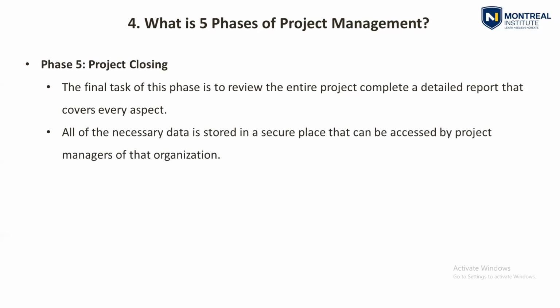And they can access anytime at any period of time, maybe 10 years after the project also, they should be able to access, because to identify the risk on the same particular projects they are going to handle in the future. So maybe it can be saved in your company's local servers also, you can save those documents and it should be protected, access should be given only to project managers. If you give access to everyone, maybe the files can be deleted.